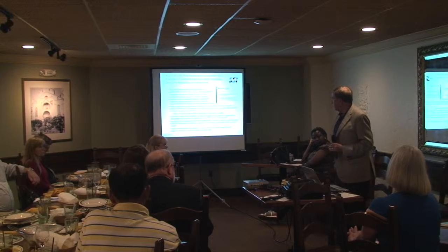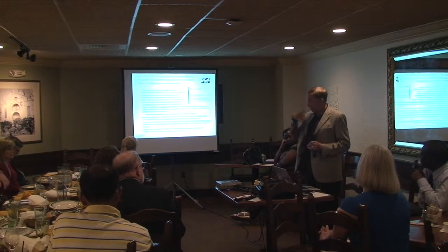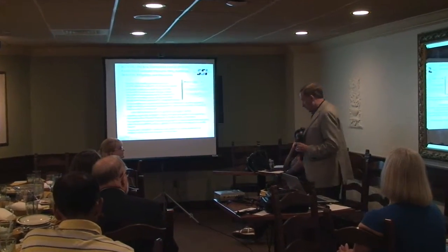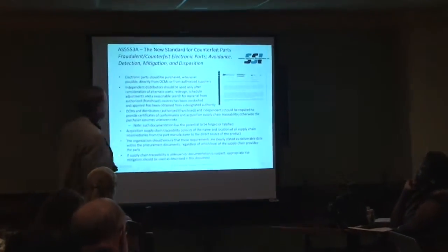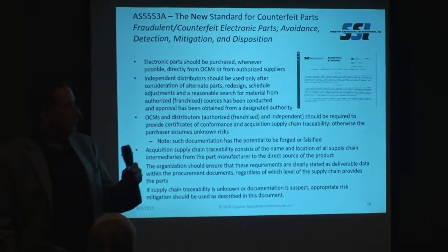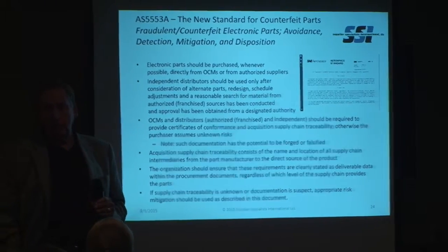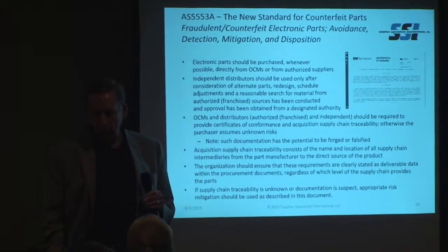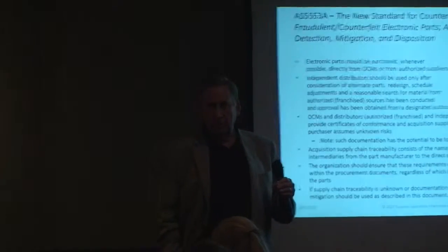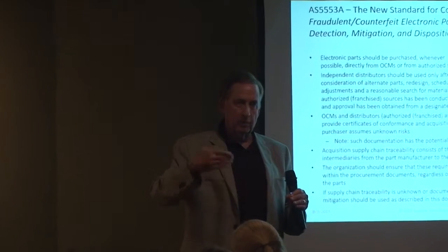So it is a big issue. There's one other thing. You guys are all familiar with SAE because they have AS9100. Well, they also have released a standard called AS5553, Revision A. And the government actually used that standard. A lot of the things that were called out in AS5553 found their way into the DFAR clause, including the priority of where you're going to go to buy things, like from the original or authorized distributors.